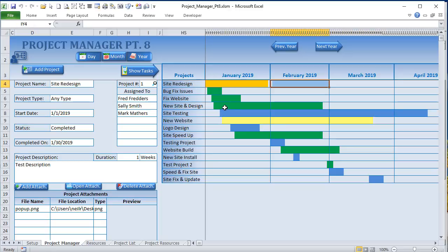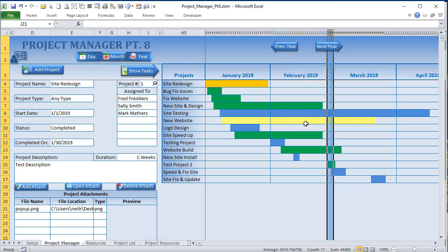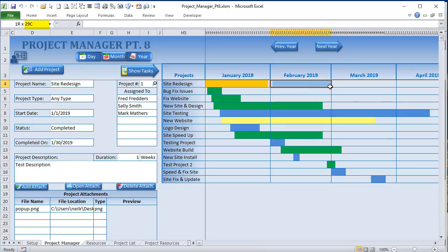When we update the schedule, I'm going to show you how we show whether it's 28 or 29 days, and we do that with a hidden column. We're going to hide or show a column based on the number of days, based on the leap year. Here it's actually 29 days, but because 2019 is not a leap year, we're going to hide that column. As soon as we refresh the schedule, just by updating it, it's going to hide that column.